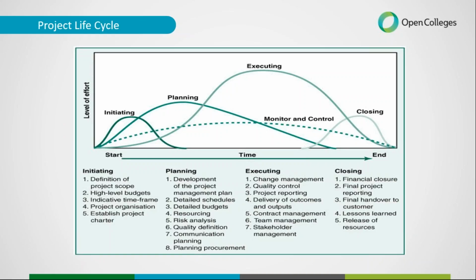So, for example, when we have that approved budget, that becomes our baseline, and then as we start to move through the project and we're incurring our costs, we measure our variances off that approved baseline budget, etc. So we can see if we are on track with the project or if we're starting to go off base. And that work stage of the project is the execution stage. Sometimes you might hear that as the implementation stage or the delivery stage of the project, depending on industry and companies. But that is when the work really gets done.